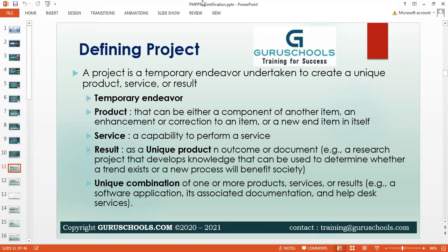But when I say I want to make tea every day, I can't do a precursor planning, because when you say every day, I might need 2 kilos of tea powder, I might need 3 kilos of ginger, but no, I can't have that much ginger, right? It'll get spoiled, perished. So a process has a repetitive result. A project has a unique result. Does that make sense, Vijayji? Now, a process has a repetitive result, and a project has a unique result.